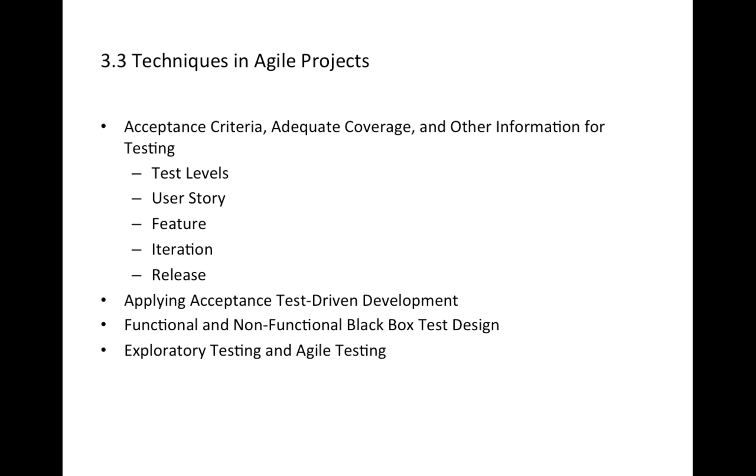Now the definition of done for the user story may be determined by criteria like: the user stories selected for the iteration are complete, understood by the team, and have detailed testable acceptance criteria. All the elements of the user stories are specified and reviewed, including the user story acceptance tests, and tasks necessary to implement and test the selected user stories have been identified and estimated by the team.